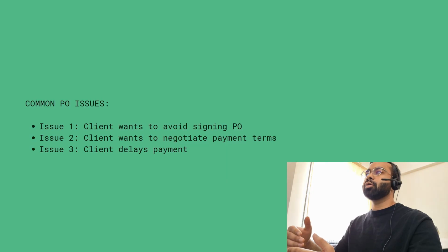MVP payment gives us confidence you are satisfied with the approach before we finish. Final payment ensures you are both happy with the result before money changes hands. This is standard across consulting, software development, etc. I am not flexible on this term. They accept it's reasonable. Issue number three is client delays payment. Invoice due 30 days after milestone one.